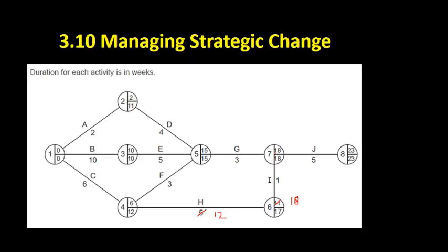That will have an impact on this task here because the earliest start time was 18. Now we've got to wait until activity I gets done. We can't start activity I until week 18. Activity I takes one week. So that's going to make this 19. Plus five equals 24.